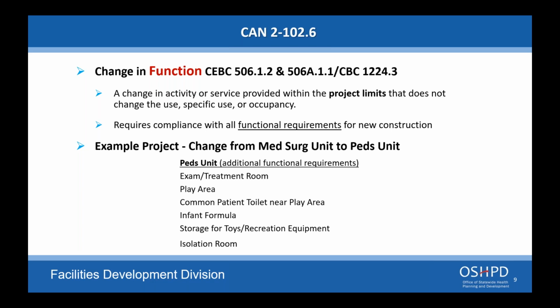The same thing would apply. I think maybe that's where you're going with this. You're renovating med surg to med surg. You're doing some remodels, but you're not touching the soiled utility room or clean utility room or nourishment room, and you want to reuse them. No further upgrades would be required to those rooms if they are not in the scope of the work.